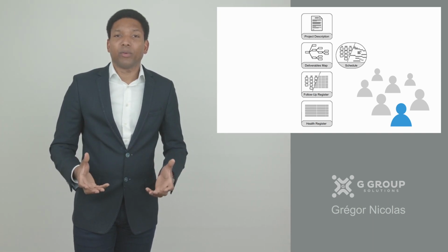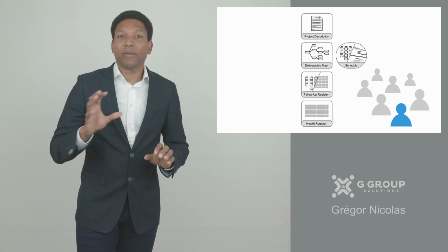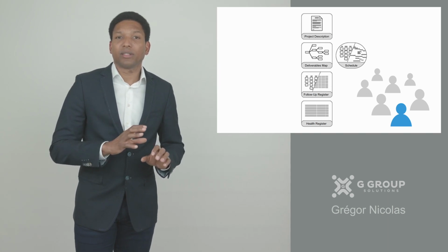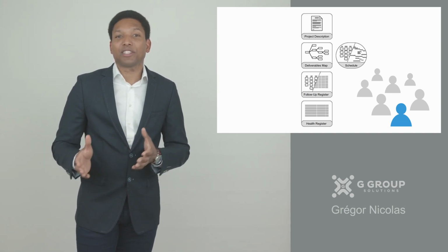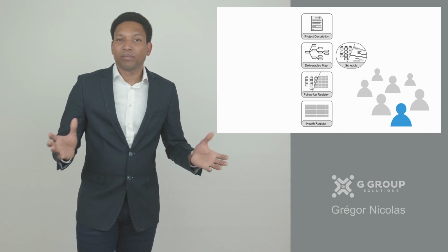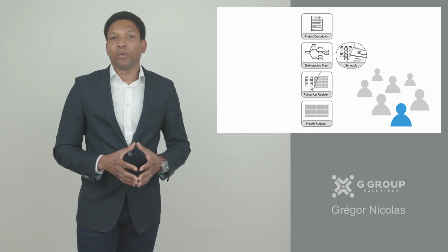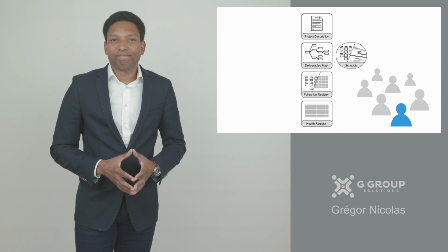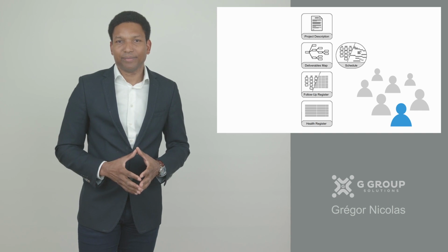After that, you identify your risk. And once you identify the risk, you also plan directly for the response to make sure that you're capable of responding to that risk. Response doesn't mean that you act upon the risk, but no action is also an action. You might decide that this is going to happen, we're just going to let it through because we can go through it. An example might be the weather. If it rains and you're running, are you running for cover or do you just keep on running?